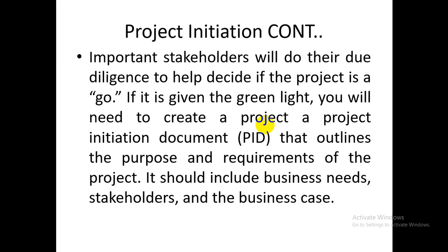For those who are doing procurement, when we are doing due diligence, we try to find out whether components, resources, and all other requirements needed to complete this project are in place. If they are not in place, then maybe the project is adjusted, or you may get other alternatives. Otherwise, if the due diligence is successful, then the project will go on.